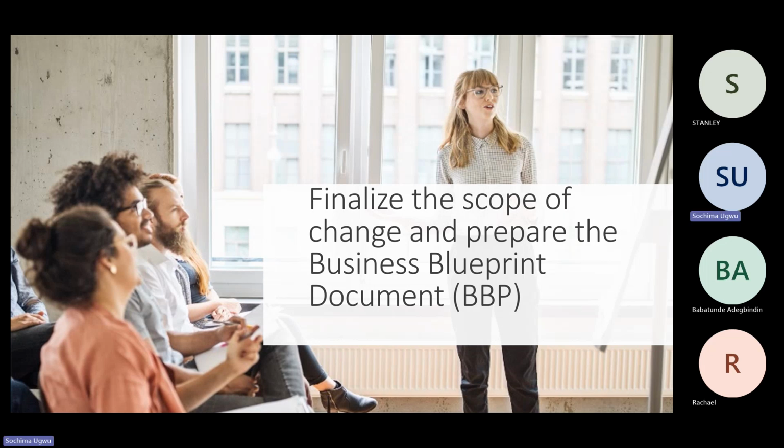But when we finish our fit gap analysis, we'll have a clearer understanding of what needs to be done as well as what does not need to be done. So that helps us to build the scope thereof. And then once we are done with that, we'll have to create what is known as a business blueprint document. Now, normally, creating a blueprint document is not typically the role of a business analyst, though a business analyst might contribute to it. If your organization has a functional analyst, then they may be in the position to do that documentation for you.